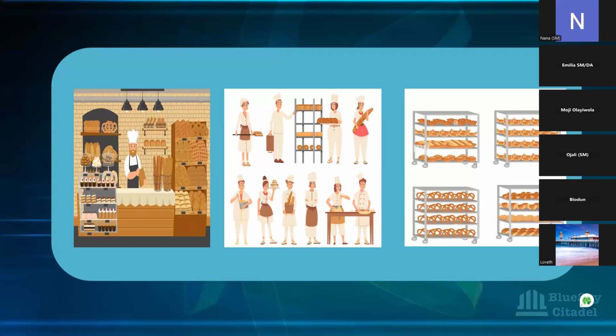And guess what? Your product owner doesn't need to learn about capacity planning at sprint planning, because before sprint planning he had already discussed with the customers, the client, the project sponsor, to say we'll be able to do this. But if you had planned the capacity, let's say roughly a week or 2 to 3 days before the sprint starts, the availability of the team because of the planning you have done, you would have prepared that.